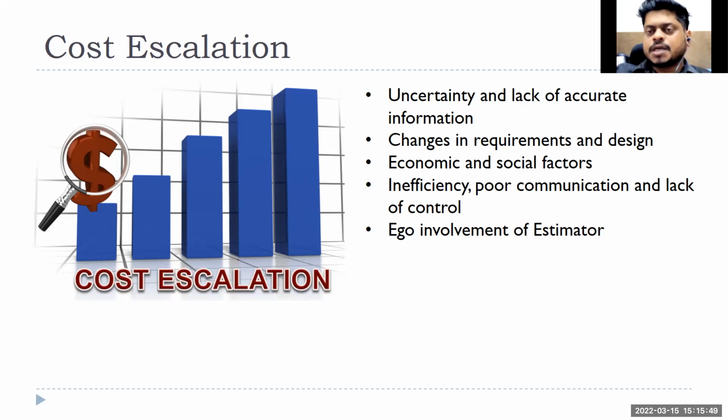Plus or minus 10% can be managed. You can go and take that approval without much difficulty. But if it is a 100 crore project, plus or minus 10% means 10 crores extra. No company is going to give you that approval. So the first question will be, why did you make that mistake, right? And that is where your project manager experience and work ethics will come into the picture. Without troubling others, how are you able to manage the work within the budget?